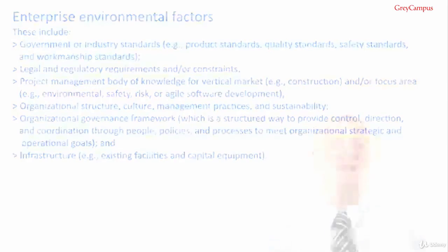For example, if you're planning a construction project, you would check to see what construction machinery and vehicles are already in the company, so you can work out if you can borrow them from your project or if you can hire them from outside, and you'll check this availability by looking at the relevant project calendars for those resources.